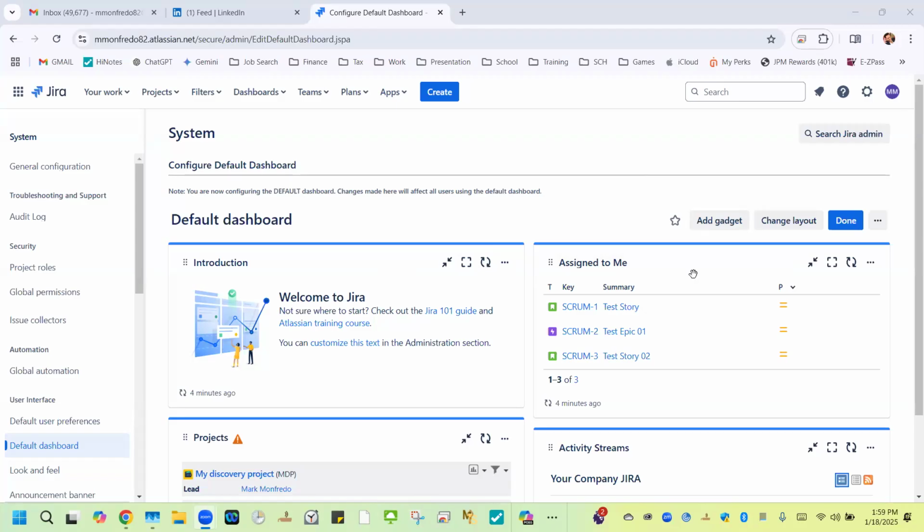This is a great widget because at any given point, any epics or stories or bugs that are assigned to you will come up in this window. So this is something you could check first thing every morning, like we've discussed in previous videos. As the PM, I ensure that I have a rule that anytime a story is created, if that story does not have an owner, I have the owner default to me as the PM. I review it and then assign it accordingly and speak to whoever's working on it.